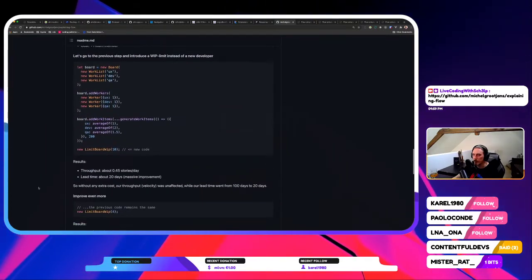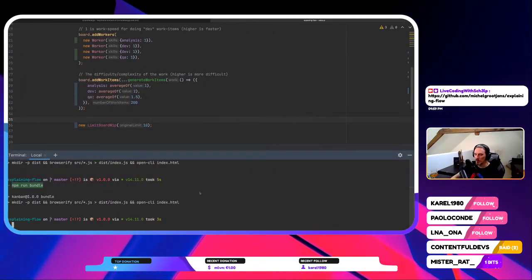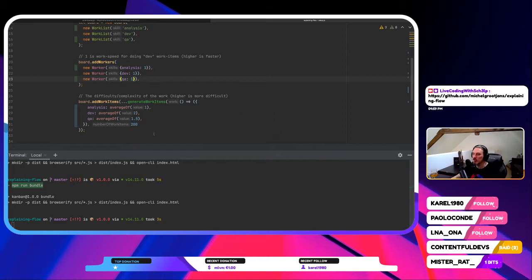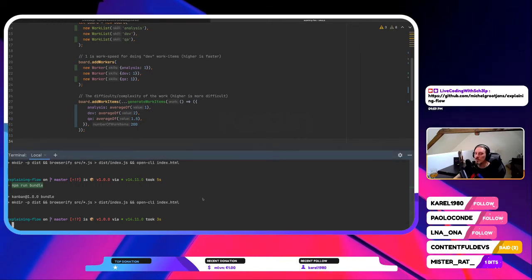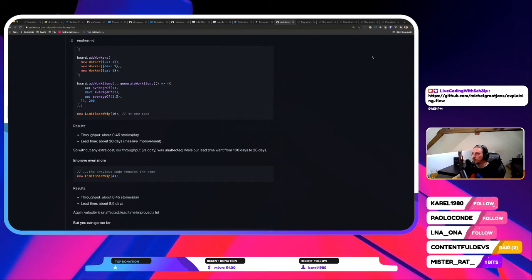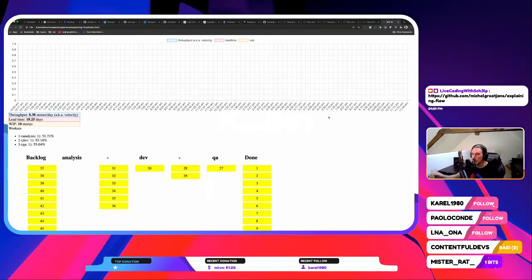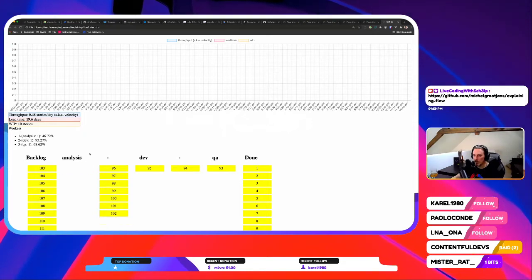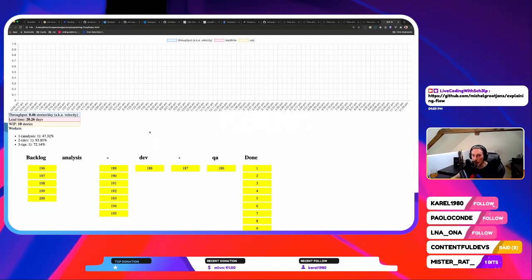So we set the limit board WIP to 10, and let's see what this brings. Instead of adding a new developer, let's just decrease the amount of work in progress for our team here and run the simulation again. All right, here we go. Now we can see the work in progress limit is 10. That means throughout the entire system of our team, we put a maximum of 10 items in progress.